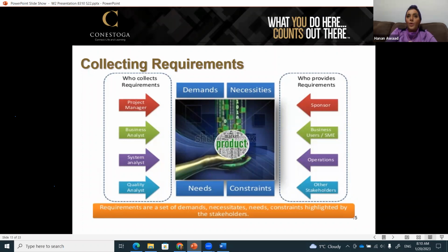And they will tell us, okay, we can use a credit card, we can use PayPal, we cannot use any other way. For example, we cannot use Stripe or some other tool to receive money. These are the only two methods that we can use. So these are constraints. It's part of the scope. We got this piece of information from the other departments.